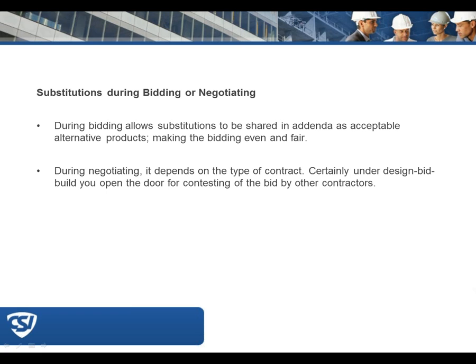I'd accept substitution requests from product manufacturers and subcontractors pre-bid, without them having to go through the GC, and then if they're accepted, they're acknowledged in an addendum, and that addendum is distributed to all the plan holders. And Doug, would you require your mechanical consultant, if that's who it was, to receive and review that? I would not let it go directly to my consultant. It needs to come to the design lead in those cases when it's the architect.